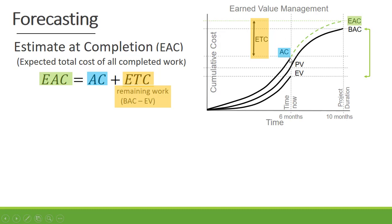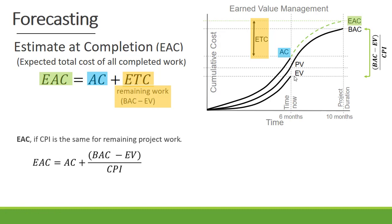So it is our actual cost at a specific point in time plus our estimate to complete — the remaining work to complete the project — which is our budget at completion minus our earned value. Now if the CPI is the same for the remaining project work, in order to forecast our estimate at completion, it is calculated as our actual cost plus budget at completion minus earned value, divided by the CPI.